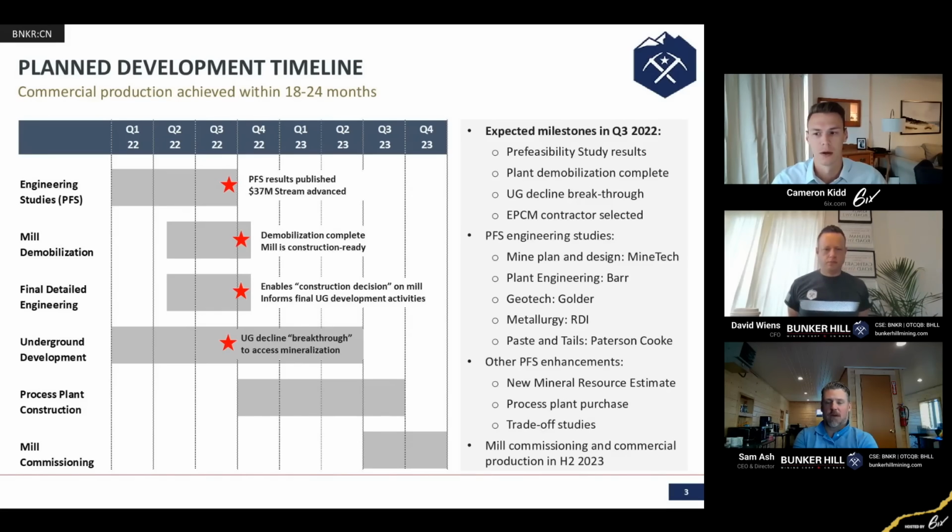The acquisition of the Pend Oreille mill created a high level of certainty, and all of the contracts and the costing around that were set in place earlier in the year before we really saw inflation ramping up and spiking. So the process plant represents the largest component of capital spend in the restart. It was very helpful that the acquisition cost of the majority of the components for the processing plant was done just before we saw a huge uptick in inflation.